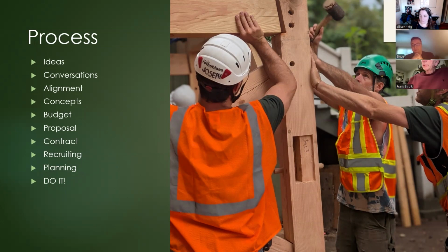And part of that recruiting is for the instructors. We'll hire a team of instructors. It might be just 1 or 2. It might be 10, depending on the size of the project. And we'll hire them well ahead of the event, and they will spend a number of weeks in regular meetings, discussing the project, making plans, reviewing drawings, preparing materials, tool lists, that sort of thing. Meanwhile, the volunteer roster is filling up, and we're in communication with the volunteers and keeping them informed as to whether they have a place on the project or not. Sometimes we're oversubscribed and we can't take everybody who applies. And eventually the planning comes to an end, and we all show up and start making sawdust and build a nice timber frame.